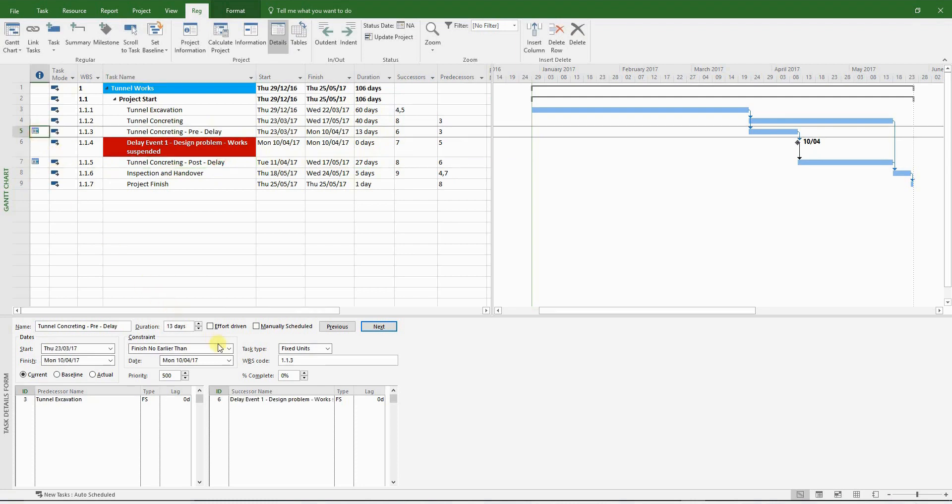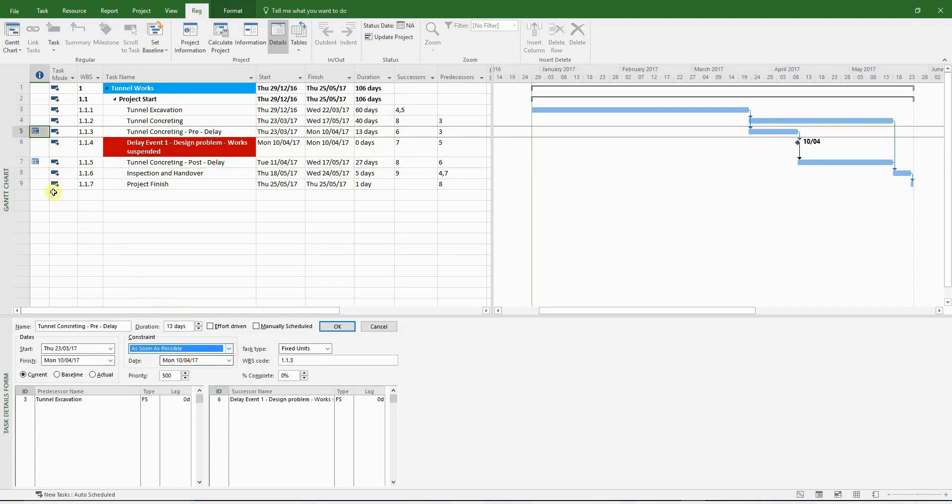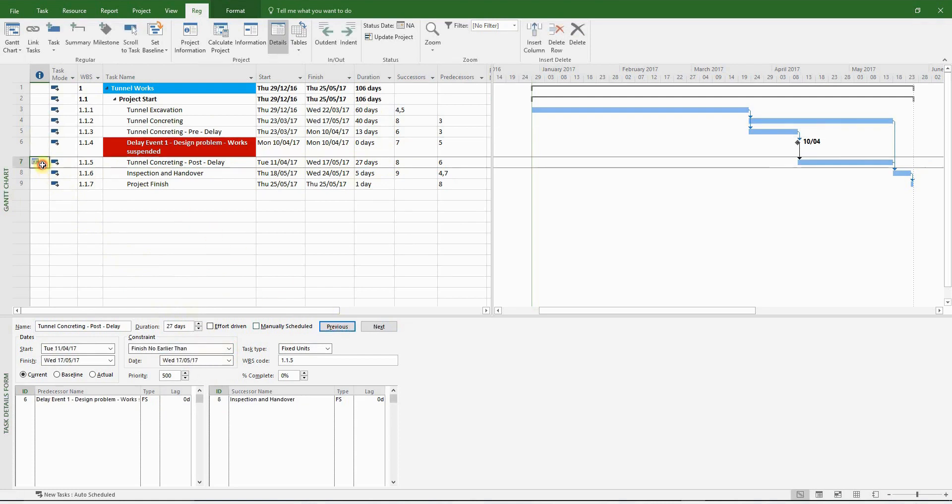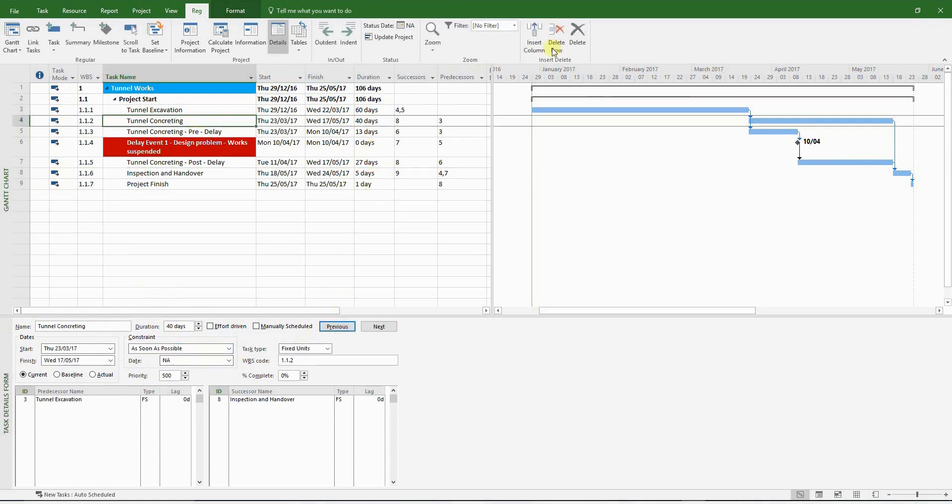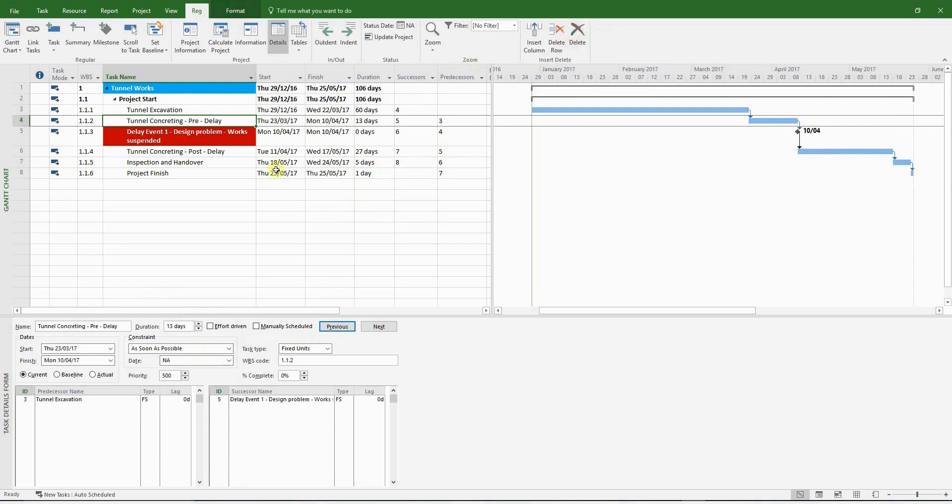Now it's time to remove the constraints. So choose the relevant activities, go to the task pane below, and change the constraint setting to as soon as possible, which happens to be the default setting. Now we can safely delete the original tunnel concreting activity.